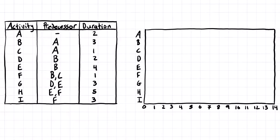If you need to change the order around later for some reason, that's fine. But to get started here, activity A has no predecessor, so this is going to start at the very beginning of our project, and it has a duration of two days. So we're going to come to our Gantt chart here, and we're going to start activity A at zero and come across two days.